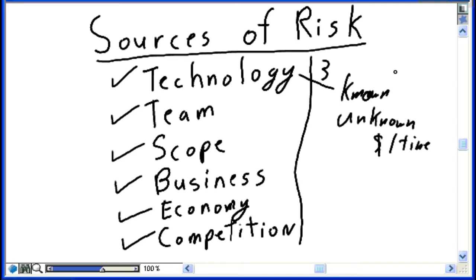and the unknown risks. A key component when you're dealing with risk management is not to confuse the specific allocations you've made for known. You allocated 5 days and $5,000 of specific risk management funding to deal with team training. Do not consume that allocation for unknown risks. If you have specific funding for known risks, deal with it specifically, have additional allocation for the unknown risks. The key in good, successful risk identification is look at all sources of risk and ensure that you're covering all possible areas and providing the additional allocation for unknown risks, because there will be unknown risks that are going to impact your project.